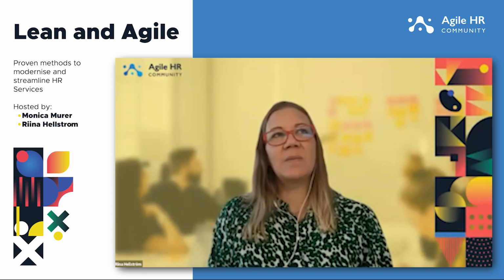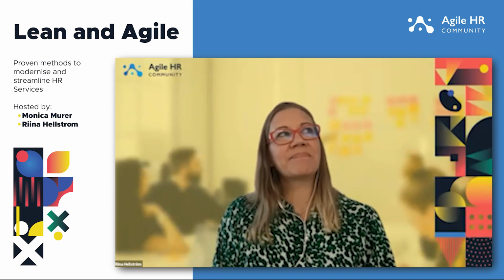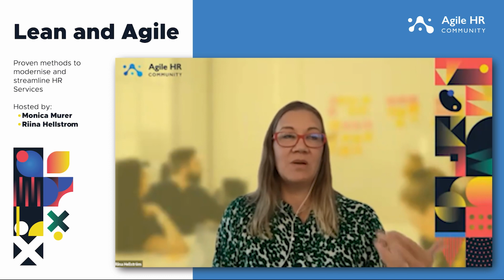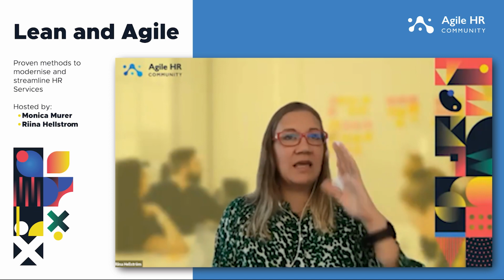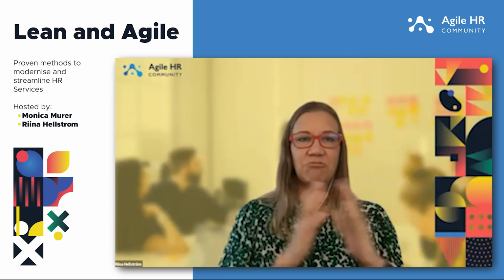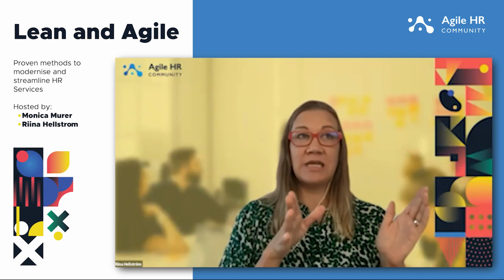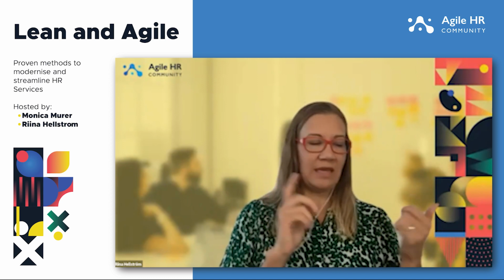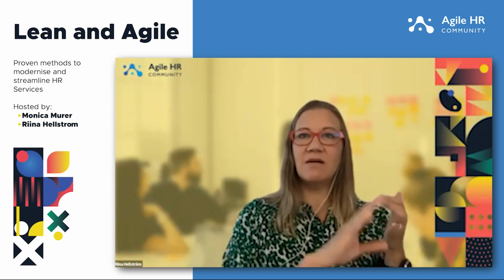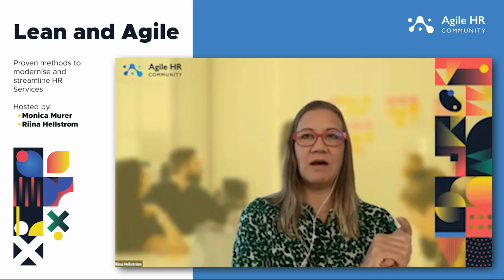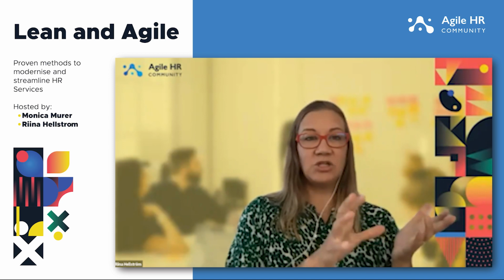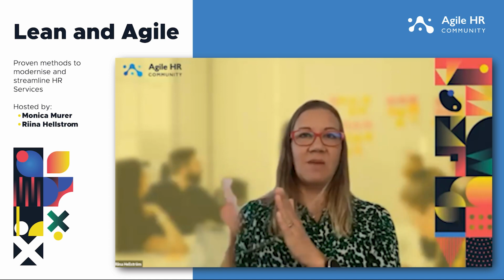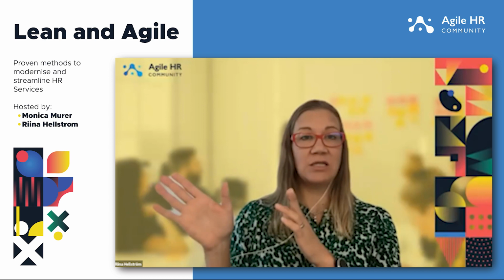Excellent. I know a couple of companies who've already mastered this on a level that when they develop global new products, processes, services, they have what they call a design team coming in to run a design sprint. And Netflix has gone down to, I think, 2 or 3 days now with the design sprint. So in 3 days, they have gone through the interviews, understanding what the needs are, building prototypes, getting feedback on the prototypes, building the final requirements, features, and testing those out with some users and stakeholders. 3 days, they've done this. Then they can move into delivering a global product to 10,000 people.